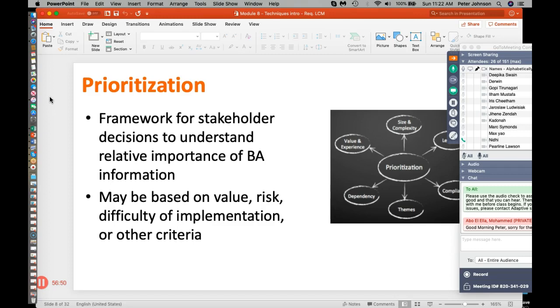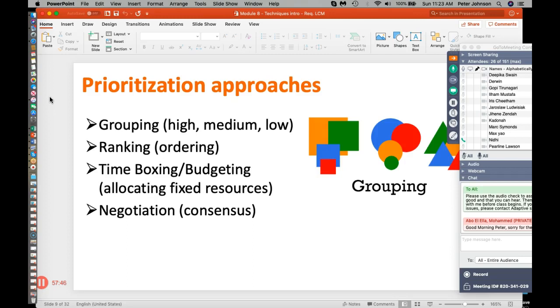If we have a lot of people in a room and we try to prioritize a list of requirements, we might get differences of opinion, even wildly different ones. It's usually because people are looking at it from different perspectives, with different criteria. So one thing we need to do is understand what all those criteria are, and maybe go through prioritization from different perspectives. First, let's look at all the requirements from the point of view of value. Which of these requirements adds more value back to the business? I might get a very different priority order than if I look at the same set of requirements from the point of view of which ones are easier to do. Where's the low-hanging fruit? Or which ones are more or less costly to implement, have a lot more involved. And so there's something to be learned every time we go through and do prioritization.